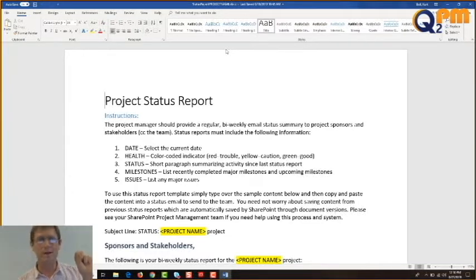That's right, Juan. So when it comes time for me to make my status report, I look through the story and I look for any items that are gray but still have a checkbox. That means those are items that we completed in the last 2 weeks, but I haven't reported to the sponsors. I'll add those to the work completed list, and then what do I do after I add it? Remove the checkbox. That way I don't report it again. Otherwise, it's up to you to remember what you closed and what you didn't close. And if you have 3 or 4 or 5 projects, good luck with that.